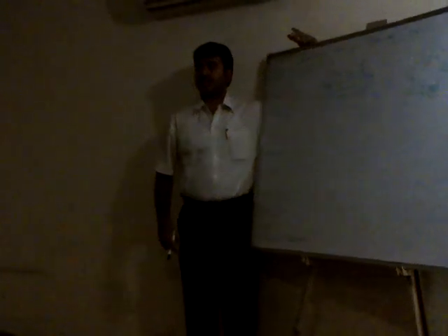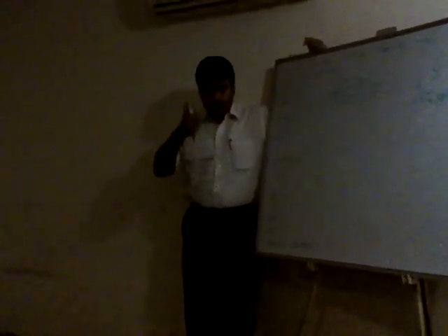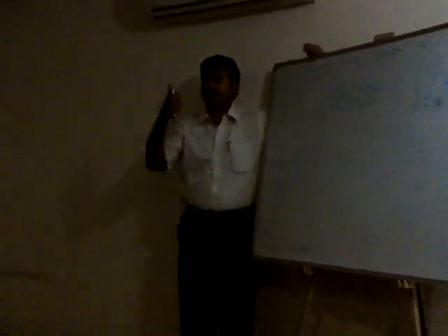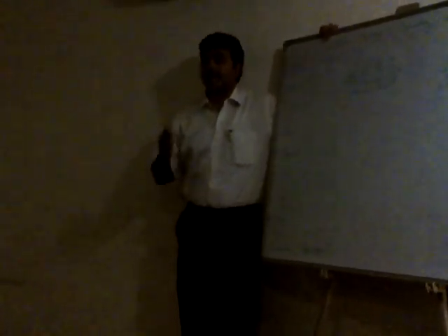Now, what was the scope baseline? Scope baseline was a combination of the WBS, the WBS dictionary, and the mutually accepted scope statement. Mutually accepted between whom? The performing organization and the customer, the client.